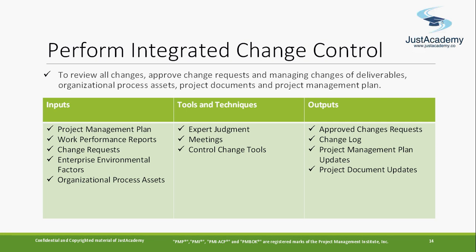So these are the few people who will be there, along with the business sponsor sponsoring the project. Normally on a bigger project they will have a weekly change control meeting, since monthly is too long a duration. They have this meeting at regular intervals to see what the latest changes are.